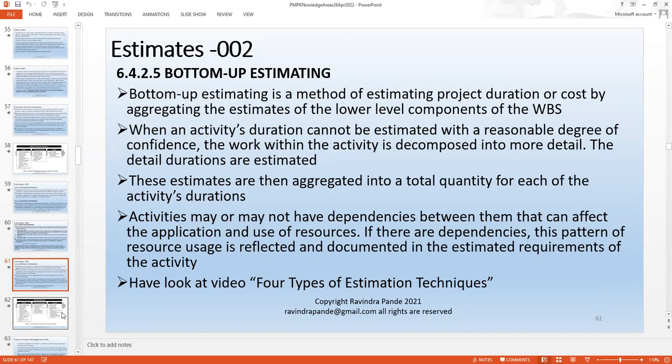Now here again, this is a more practical way. We have created the WBS previously. Now with that WBS, at the last level of task, we think how much time it will take. Like we discussed, in our WBS, the nth level task where we try to survey the land. In survey the land, I have a couple of tasks: take measure of soil moisture, take measure of soil hardness, take measure of soil stress levels, or the grip it has for those concretes or columns or something like that. So there are 3 or 4 such activities I have planned.